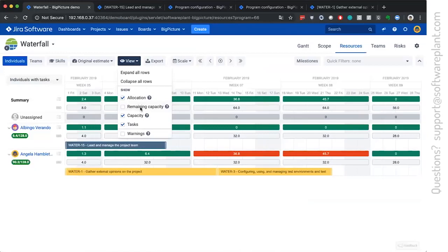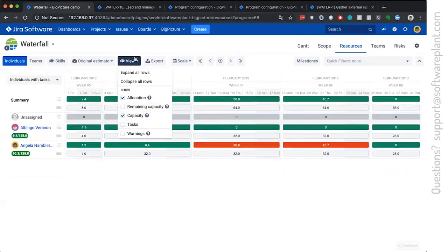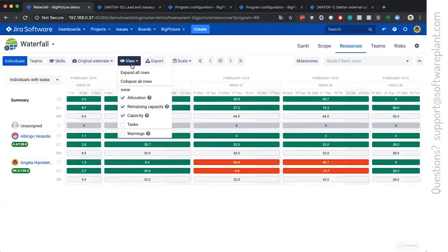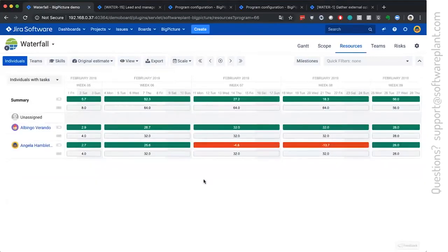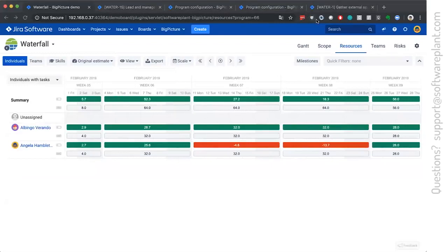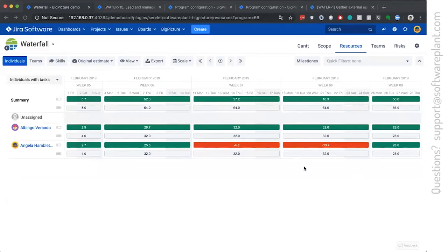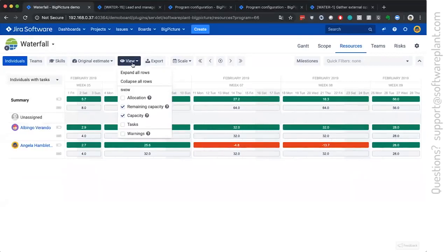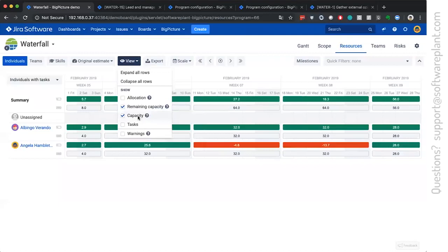And you have, you can show multiple things, you can hide the tasks just to focus on the numbers, or you can show the remaining capacity. This will not show you how much, how many hours are allocated. This will show you how many hours are missing. Here we are missing 4 hours, 13.7.